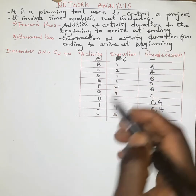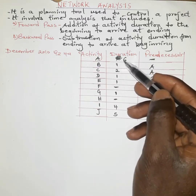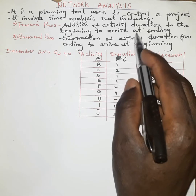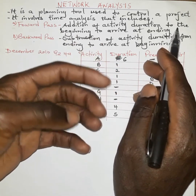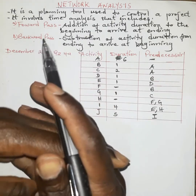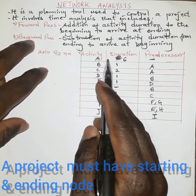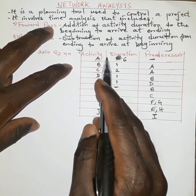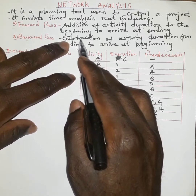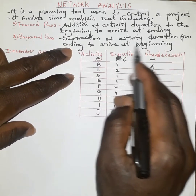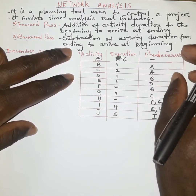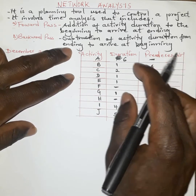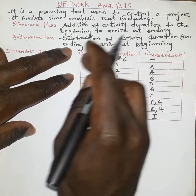For these particular activities, we are given their durations, and we will add the duration of each activity to their starting nodes in order to arrive at the ending nodes. A project will normally have two types of nodes — the starting node and the ending node. After that, we will do the backward pass, which is the reverse of the forward pass, involving the subtraction of activity duration from the ending to arrive at the beginning. After achieving the ending node, we work backwards, subtracting the duration from the ending to arrive at the beginning.